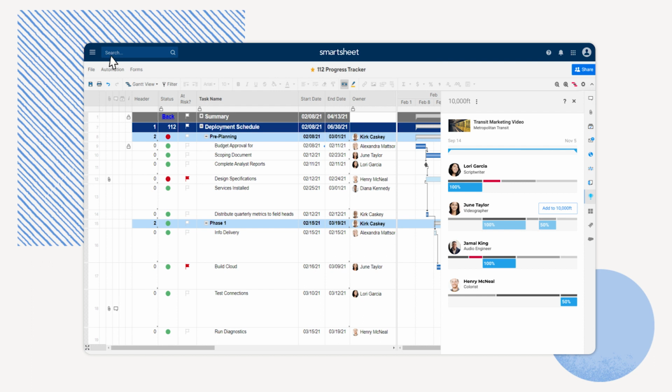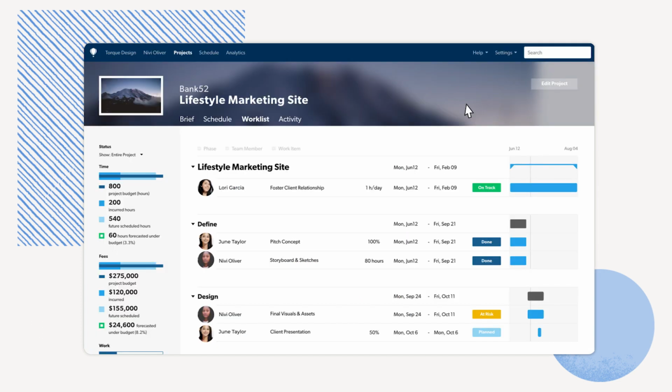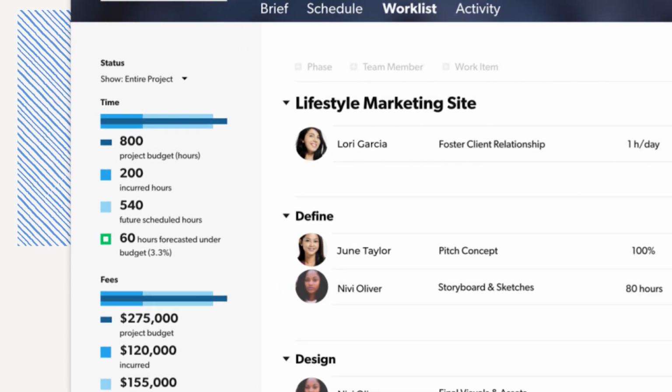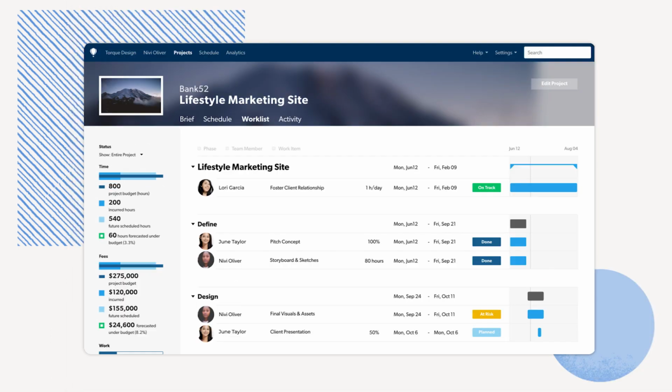As tasks are assigned in your project plan, your resource plans are also updated in real time to show allocation levels. Now that you have visibility into who's working on what, you can easily identify potential overlap and make adjustments as needed. And you can see time and expenses in real time in order to track and manage actuals associated with your project and portfolio.